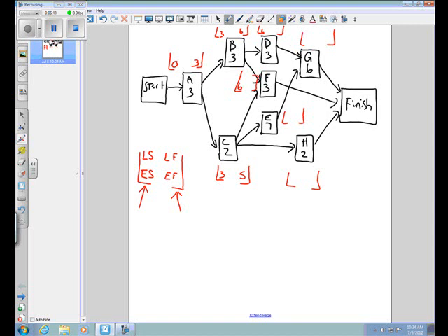Okay. Let's see if you got this right. Activity F has to have 2 preceding activities, B and C. So I have to ask myself, what's the earliest I'll have completed both B and C? And the earliest I will have completed both B and C is week 6. Activity C is completed by week 5. However, it's not enough to just have one preceding activity with respect to activity F. I have to have both. So the soonest I'll have both B and C done is week 6.